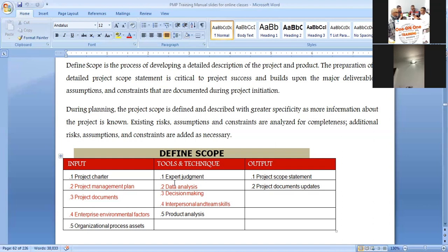They may not give you the contract if they're not asking you and the other contractors that are bidding low to come and defend your bids. They may not give you, because most times the client is attracted to the lowest bids. But remember what I shared with us, the MEAT, the most economical and advantageous tender. In as much as a particular contractor is bidding high.